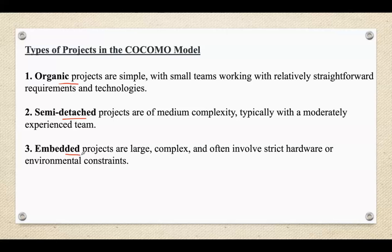The third type is embedded projects — large, complex software projects typically developed under tight hardware or operational constraints, often for real-time or mission-critical applications. The project involves complex interactions with hardware and external systems. Requirements are often highly constrained by factors such as performance, safety, and compliance with strict standards. Development teams often face high uncertainty, and the software may require a highly formalized development process. Examples include real-time systems, embedded software, aerospace and defense applications, medical devices, or automotive systems.